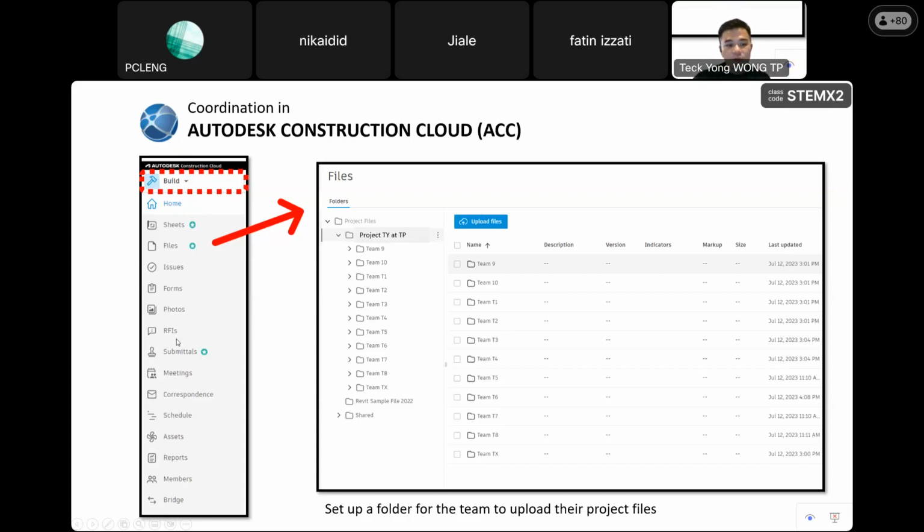Every RFI your contractor raises is captured. Email they don't capture, because inside here you cannot run away. Every day they will prompt you, hey, this one you haven't cleared, this one you haven't cleared. So you have to go into the model, make changes to make it comply or solve that issue. You click solve, who solved, and then you come back, and number one will be gone.